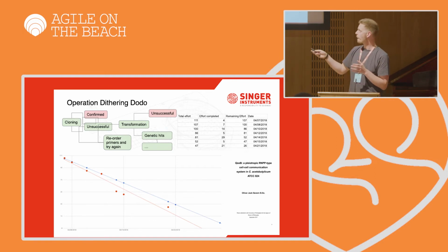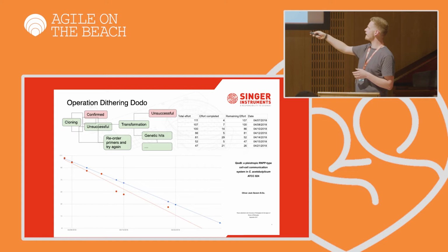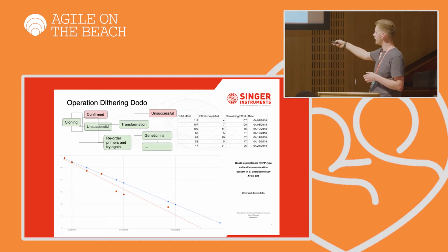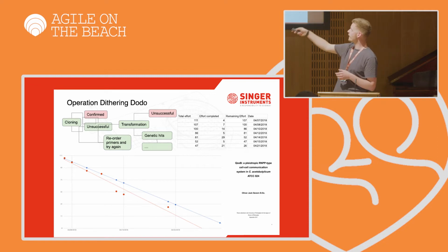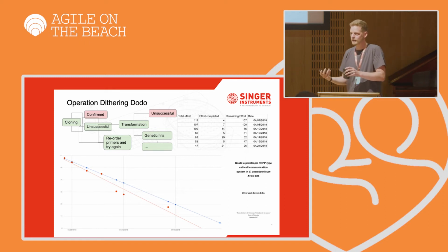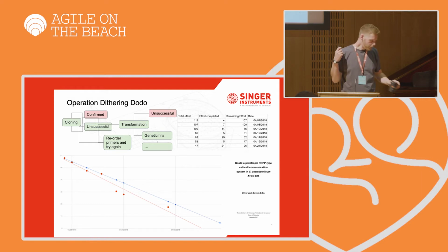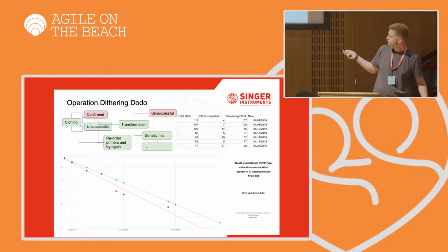So it's very simple. And this was the actual burn down chart, just brushed up in Excel, that had all the estimated efforts through an effort poker, which is really hard to do by yourself. And it led this prediction. This blue line here is the prediction of what I would need to do to hit my deadline date. And actually, by applying this technique, I delivered early, which was exciting at the time, but I didn't know if it would actually be useful from a biological point of view. Again, this was just writing something.